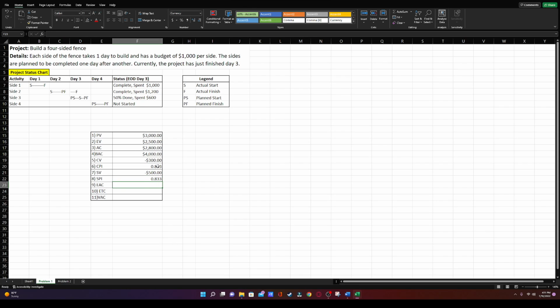So far on this project, taking a pause, we can look at the cost variance or CPI and the schedule variance or SPI, either one. Having a negative in cost variance and a negative in schedule variance, and a below 1 with the CPI and a below 1 with the SPI, indicates that we're behind on the schedule, right? And we're over on our cost for the project.